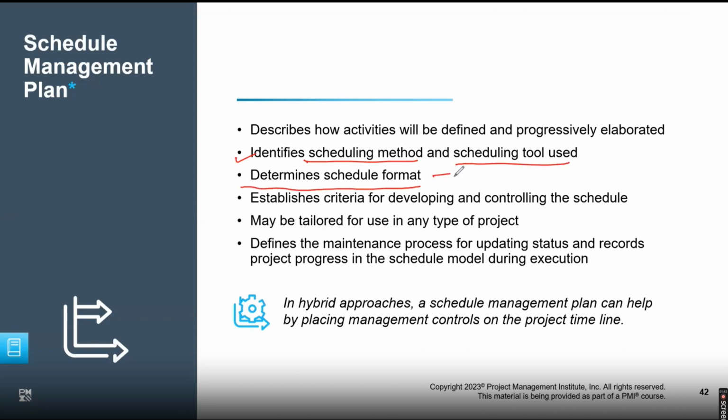Well, which would you be measuring the time in, hours or days or weeks? How would you measure it? If it's a small project, I may measure at hour level. But if it's a project which is for years, I will probably do it week-wise. Going at hour level will be insane. When you've got a 3 or 4 year long project, you will rather track your progress on week 1, week 2, week 3, because that makes logical sense.